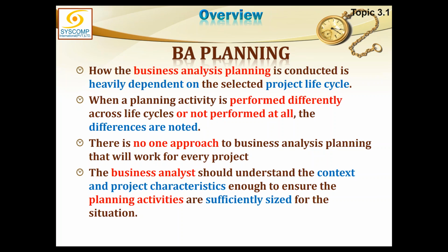Phases are divided according to the work of the project. If you are constructing a house, in how many phases you want to do it? Every phase should be surgically separate from the other phase. Every phase will have to be treated like a project by itself. Every phase will have a deliverable. But essentially, the phases are not overlapping. Later on, we can create a little overlap. But the process groups are completely overlapping. They can never be called phases. You got my point?